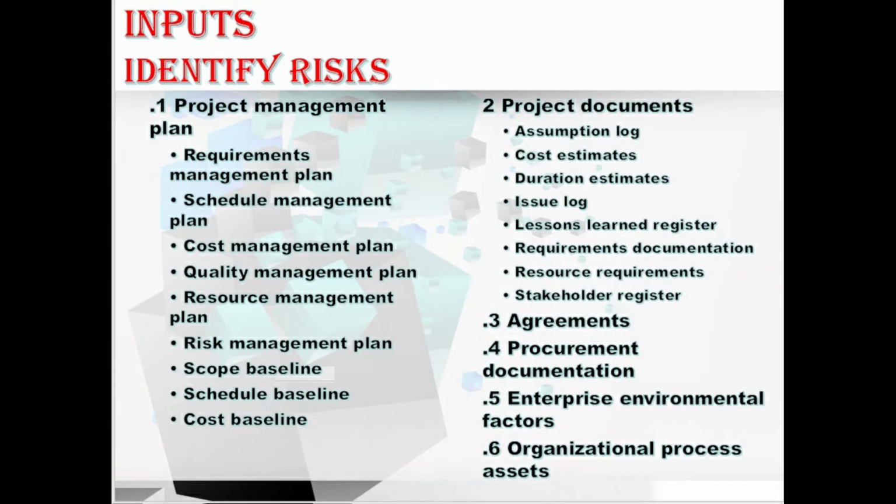Coming to the risk management plan. Here, the risk management plan provides information on risk-related roles and responsibilities, and it indicates how the risk management activities are included in the budget and schedule. It also describes the categories of risk, which may be expressed as a risk breakdown structure, that is RBS. Hope you understood this risk management plan.